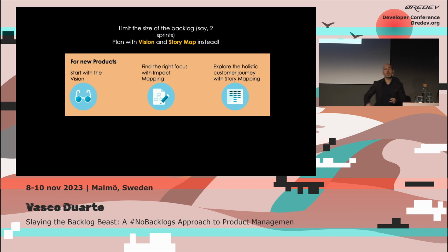So here's something that I do with the teams that I work with. I tell them, you only need 2 sprints of backlog items. 2 sprints. Why? Because, of course, 1 sprint is quite obvious. We need to know what we're going to do next. That's what we do refinement on. That's what we do planning on. Second is, there's a few items that are competing for priority. Those need to be clarified. If you don't refine those, i.e. 2 sprints, you can't prioritize, right?